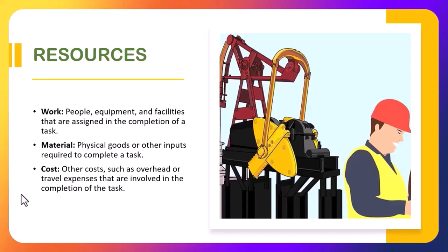Then you have cost. Other costs, such as overhead or travel expenses, that are involved in the completion of the task. You do not enter the cost value in your resource sheet. You enter the cost value of a resource only when you assign it to a task. So let's get started in MS Project on entering resources.